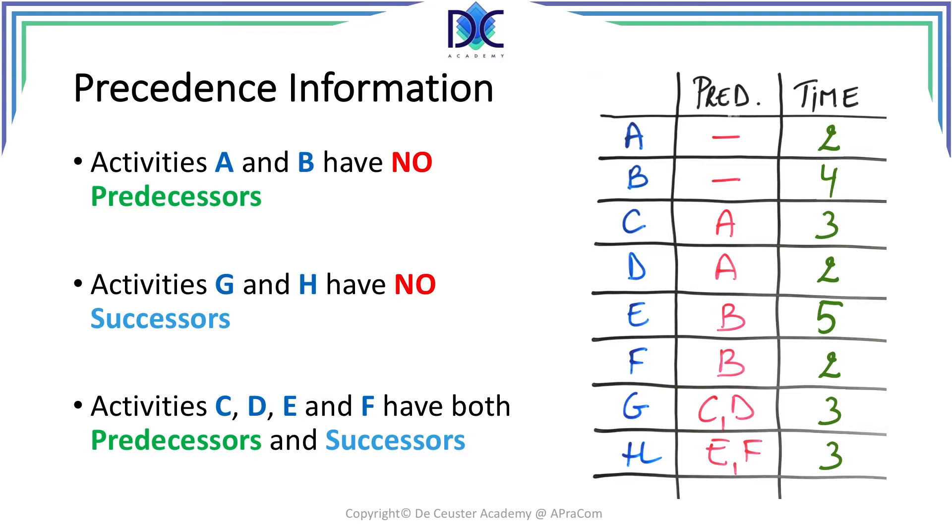We see the first two activities A and B. They have no predecessors, so they are at the beginning of the project. Activities G and H have no successors. There is no more follow-up work once those two tasks are being completed, so they have no successors. They are at the end of the project.